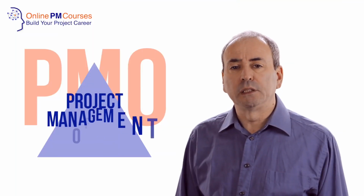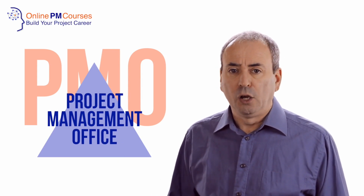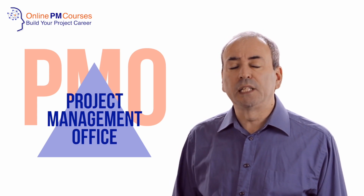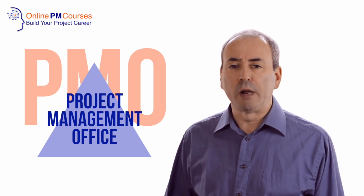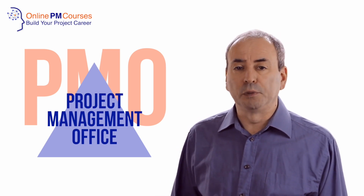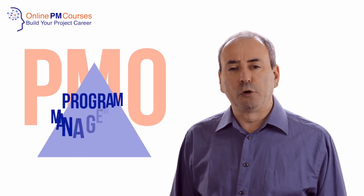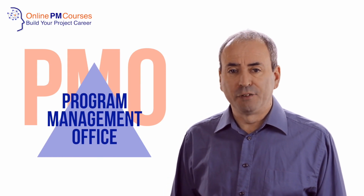A project management office has a day-to-day responsibility for supporting and the governance of short-term initiatives, typically anything from 3 months to around 2 years. The services they usually focus on tend to be collation of information, compliance and training, but sometimes they'll also provide support for project managers in the form of networking opportunities and getting the project managers together to work on good practices within the organisation.